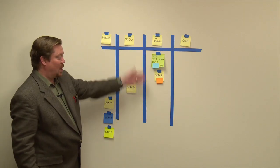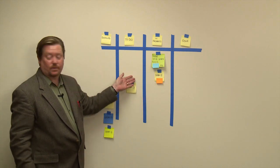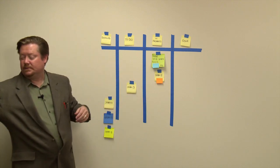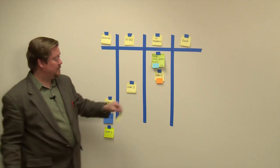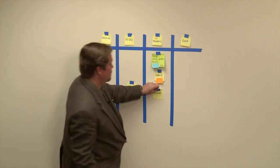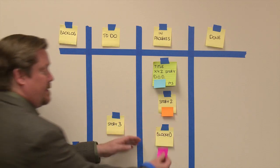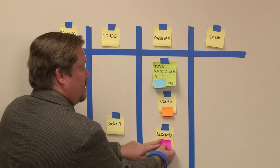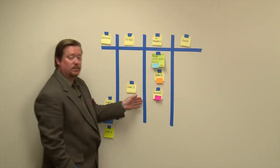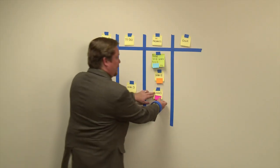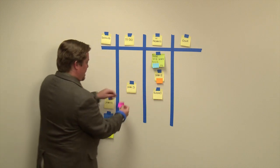Stories can get blocked. You can use a special flag to indicate blocked stories. This is a blocked story, and there's your flag that tells everyone that story is blocked. When this story is unblocked, simply remove the flag.